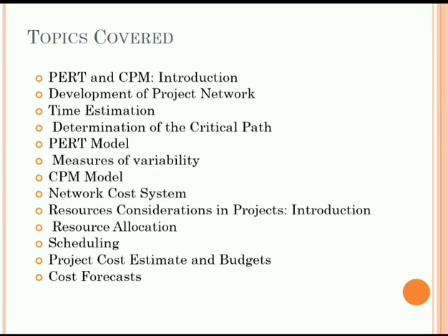Controlling communication is the process of controlling and monitoring communication throughout the entire project life cycle. The input for this stage is the project management plan, project communications, issue log, work performance data, and organizational process assets. The output here is work performance information, change requests, project management plan updates, project document updates, and organizational process assets updates.